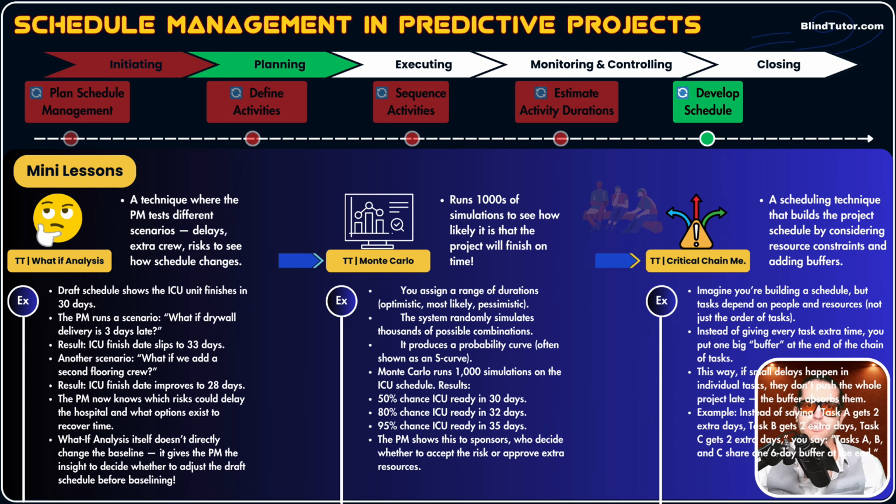Okay? So guys, to wrap it up, critical chain method considers 2 factors. One, resource limitation and constraints. It updates our CPM by considering something like a resource calendar. And two, it adds buffer to all activities. These are two changes that critical chain method, CCM, applies to our normal CPM technique.